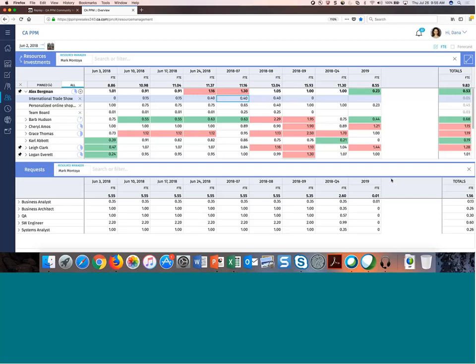That allows you to allocate them to multiple teams, and that really drives the availability of the entire team. But if you take a person off a team, yes, their availability does drop. It doesn't change the allocation because you still said, I want this team at 0.5 FTE. When you take someone off of that, it doesn't change. It just affects their overall availability.